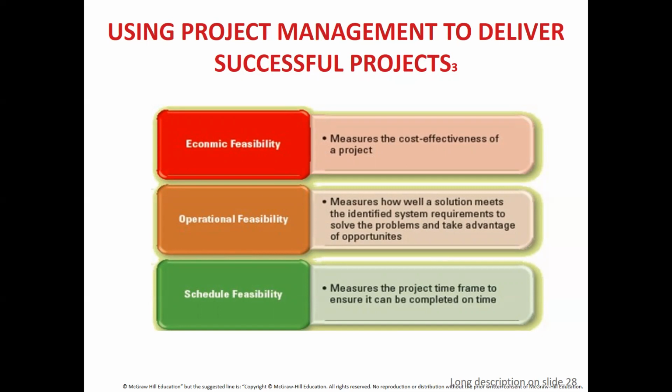Now, economic feasibility. Economic feasibility measures the cost effectiveness of a project. In other words, what you will want to measure is this. By the time you are done with the development of the entire project, will your project actually cover up the cost in a certain period of time? So in here, what you do is you calculate the total cost of ownership, and then you have a NPV done, net present value. So with those two particular elements, you would be able to know what will be the total cost within, let's say, 5 years time.